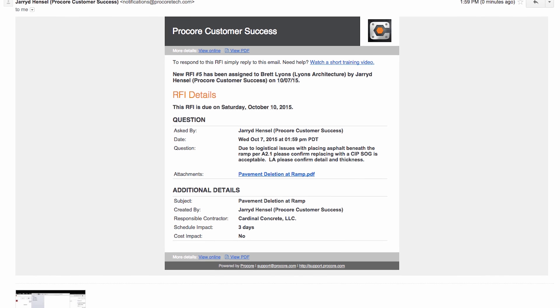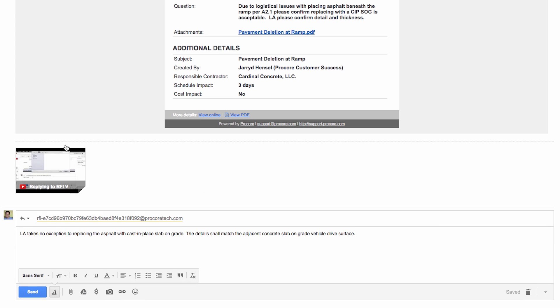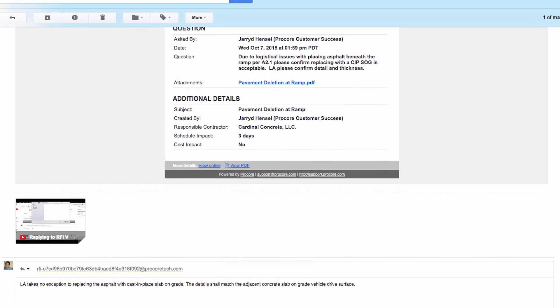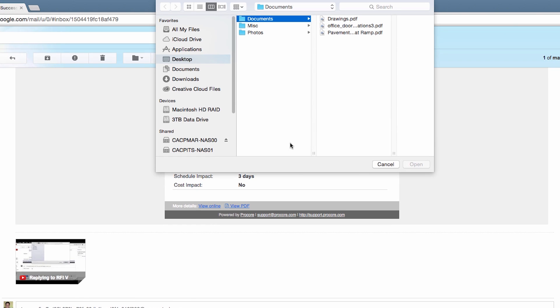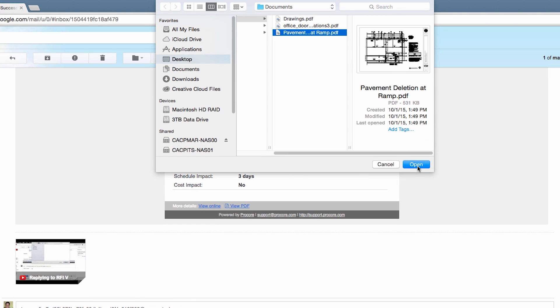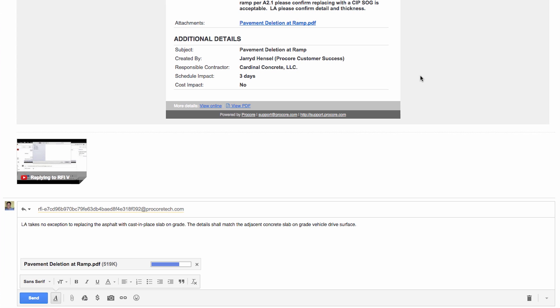Whichever route is taken, Procore will automatically log the response along with any attachments. The response will shift the ball in court back to the RFI creator and will automatically notify everyone on the distribution list by email.